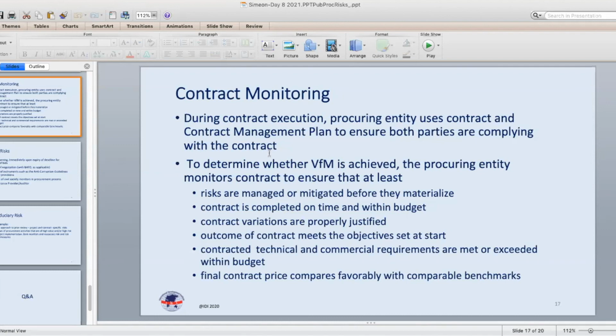definitely an obstacle. So there are certain techniques in terms of technology that may be used as risk mitigation measures, and that the World Bank promotes. For example, the use of mobile and geolocated mobile devices for the purposes of monitoring, the engagement of third-party monitors, the engagement of civil society organizations to monitor performance of contracts.